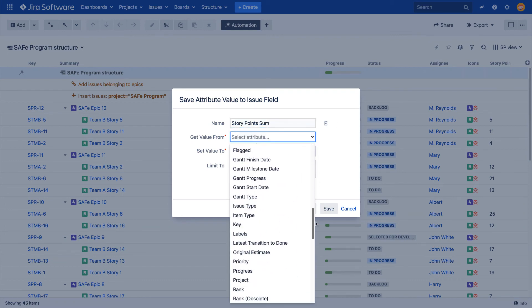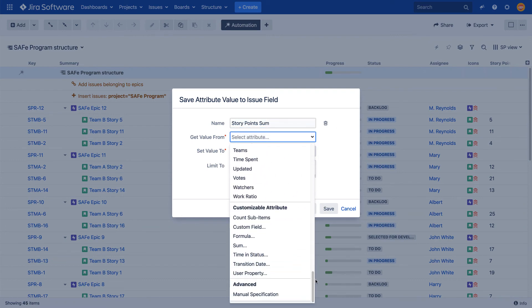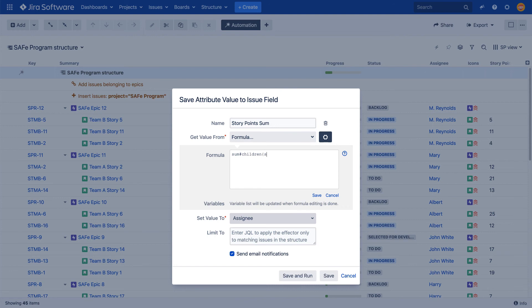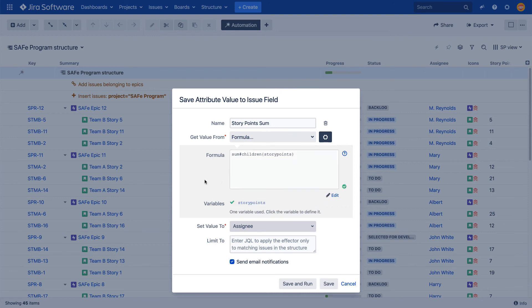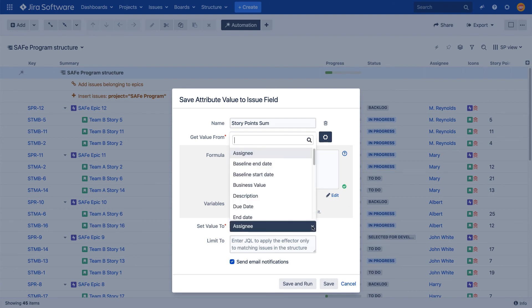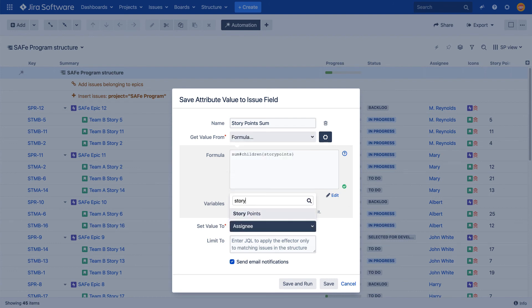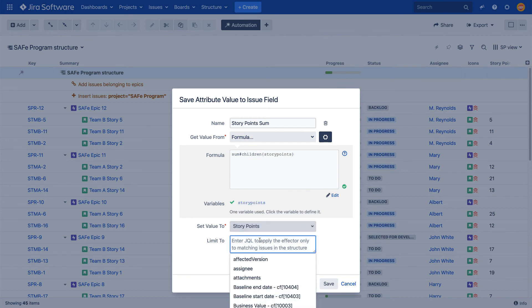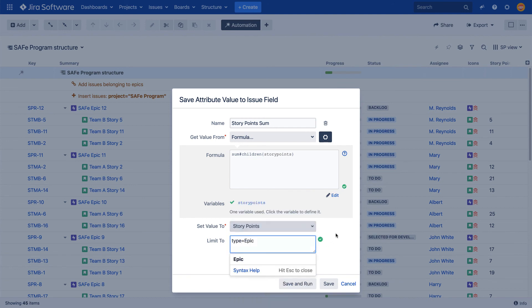Selecting the formula option as the value source in the effector's configuration opens a formula field. My goal is to take story points of stories and add their aggregated values to their respective parent epics. After creating the formula, the story points field should be selected as the field to write to, and the scope of the effector should be limited to epics only.